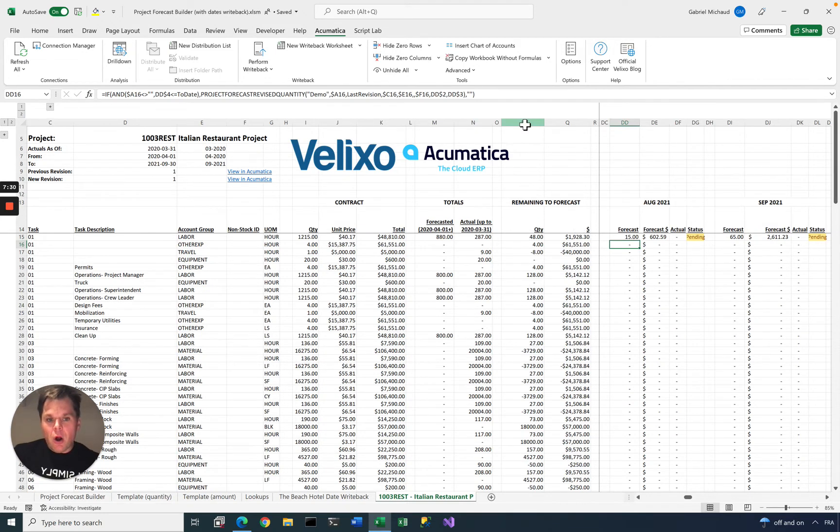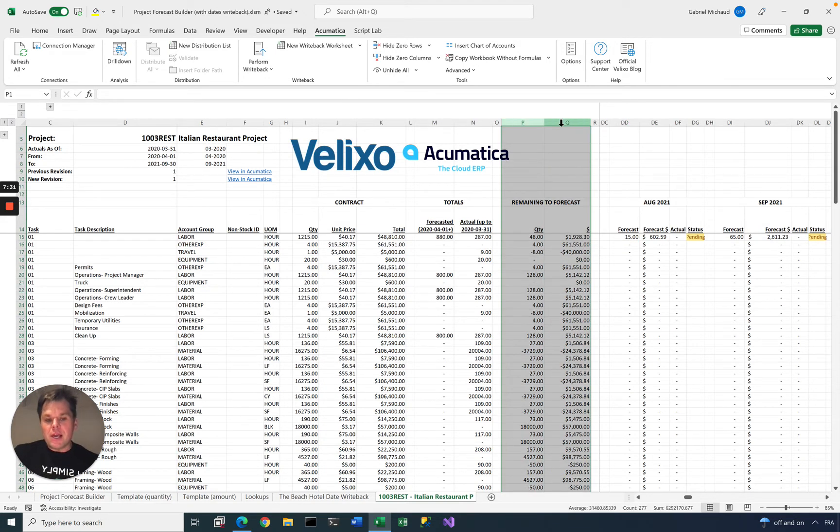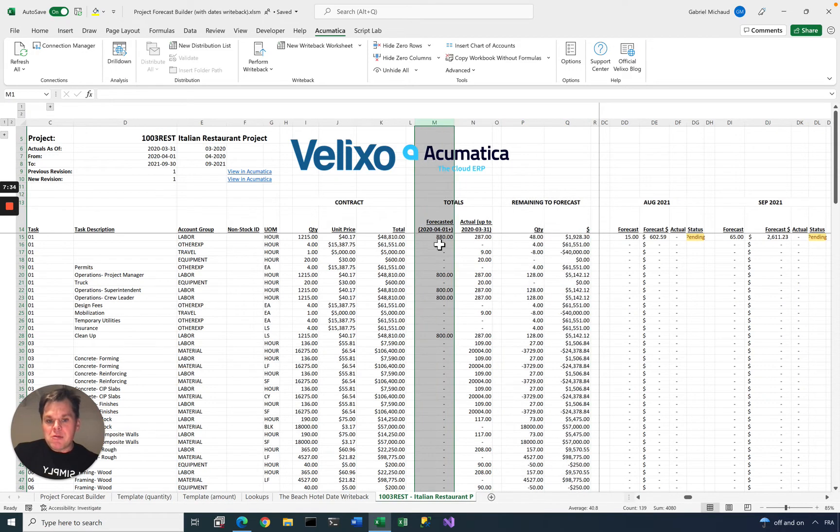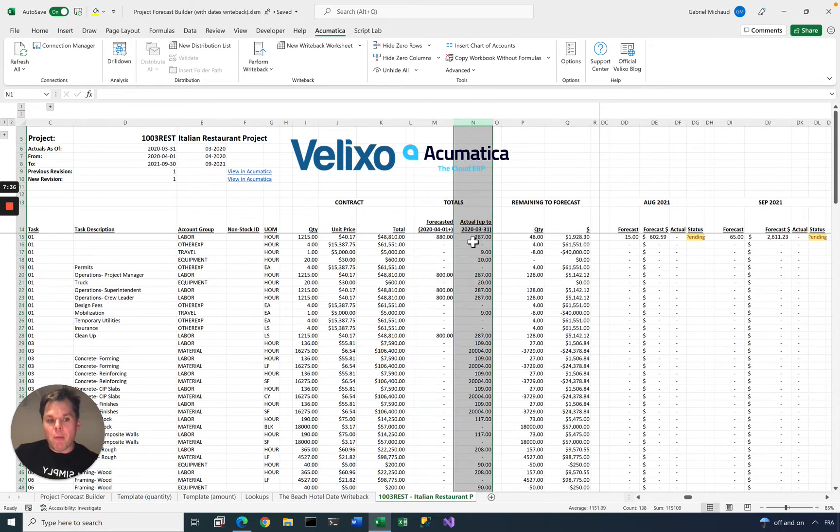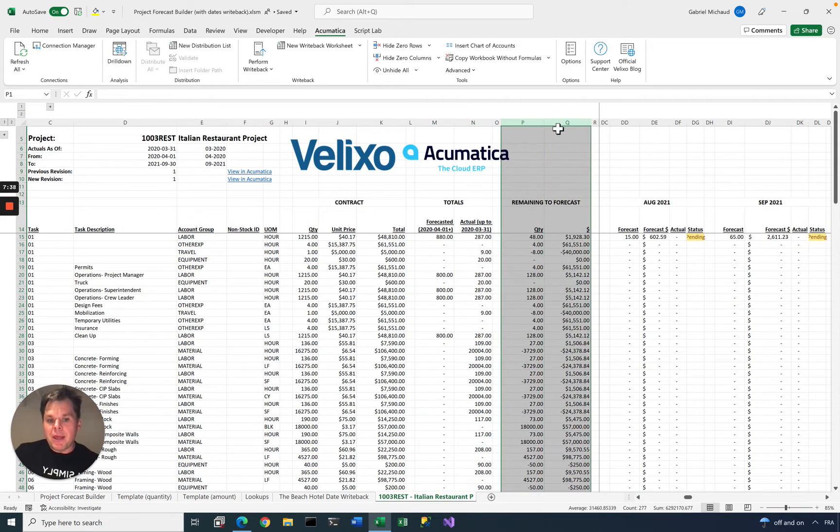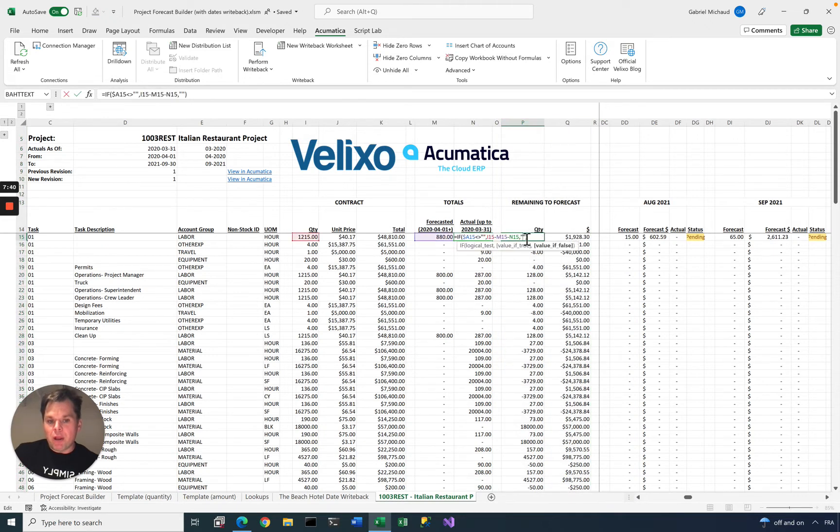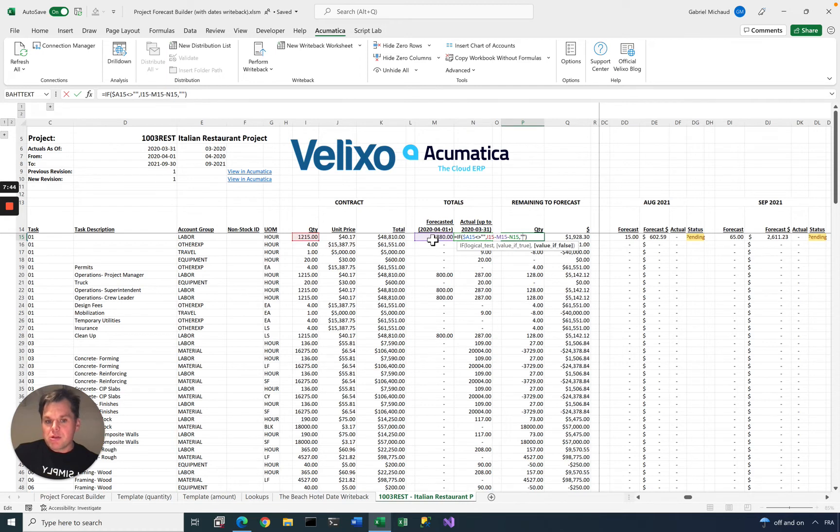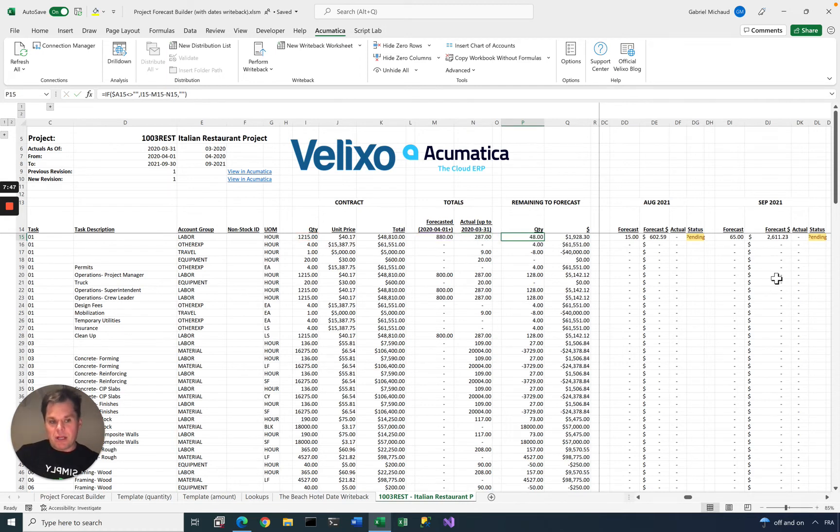Notice that we also have calculations here. We have total, what has been forecasted so far, what are my actuals, and what's remaining to forecast. Remaining to forecast is simply contract minus actuals or forecasted actuals.